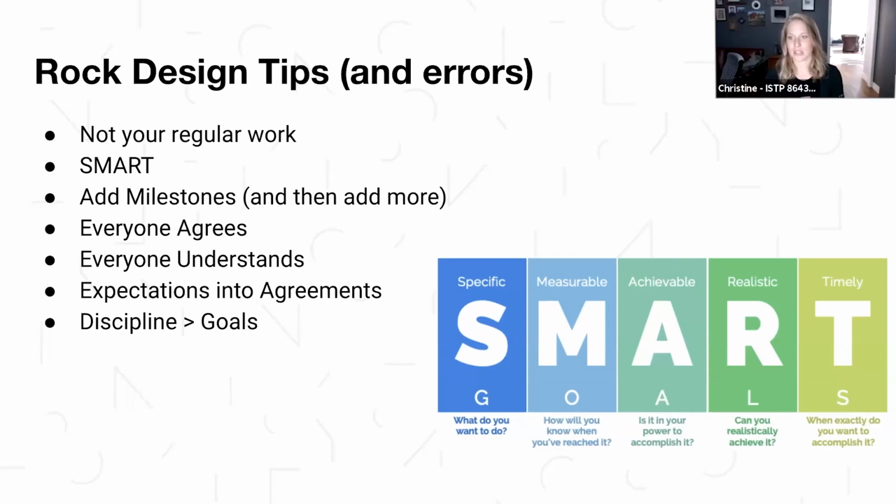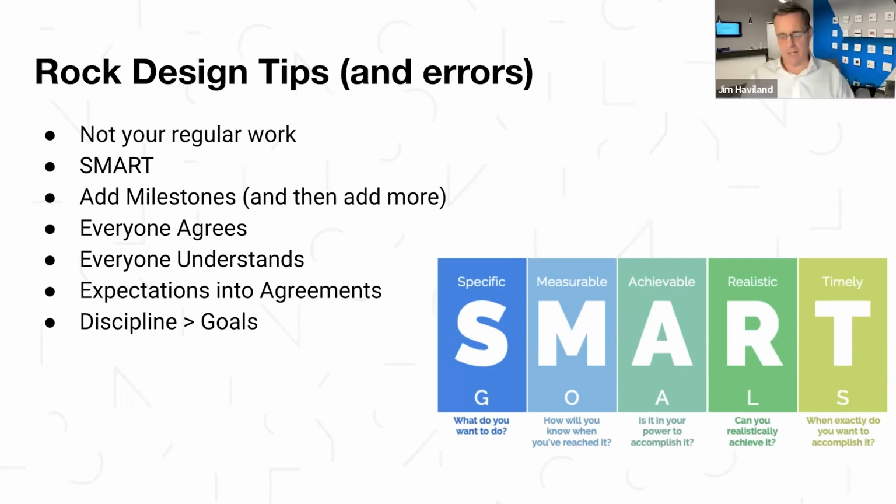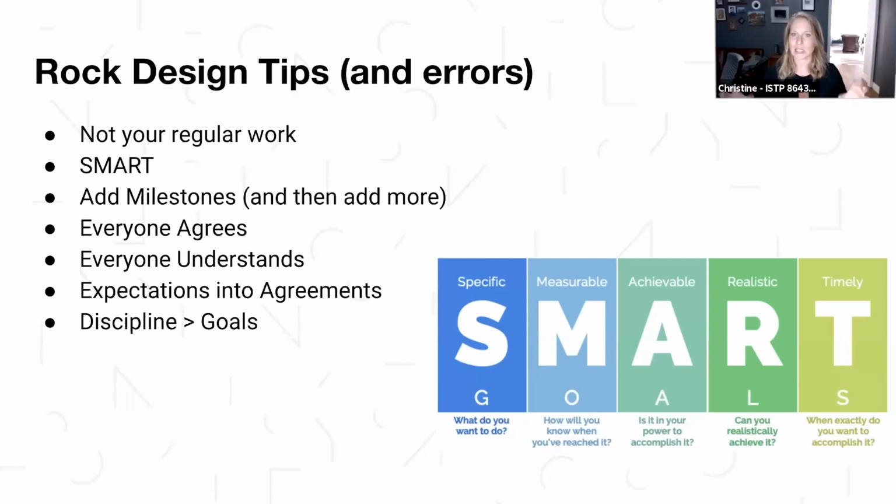I think that realistic is so important for that reason. Because you might be able to go off and accomplish this. This happens all the time for us internally, but it's like, hey, that's dependent on dev work or something that's outside of your control. Somebody else can't prioritize it this quarter. So splitting it up into what you can really do, phase 1, phase 2 for different quarters, and really thinking about it being realistic from the perspective of all the team members that are going to be involved in accomplishing it is definitely smart.